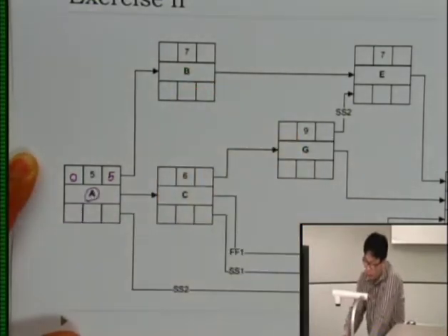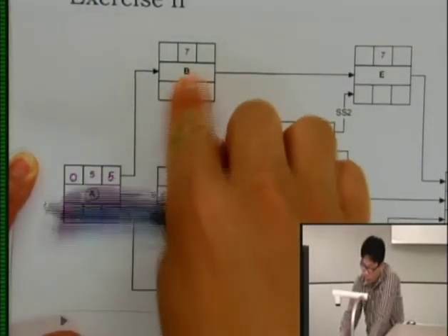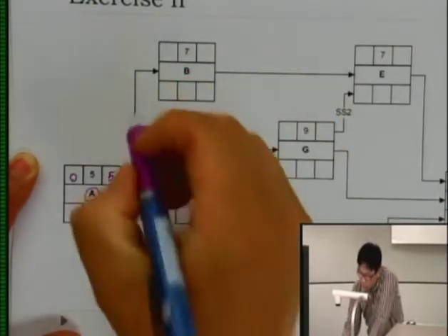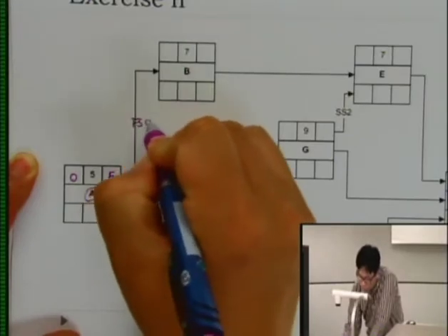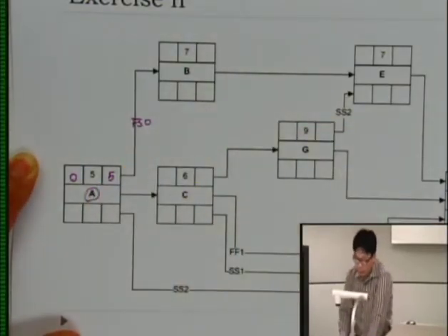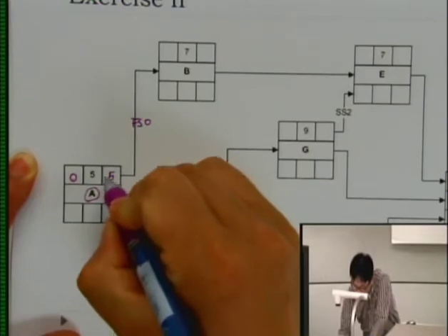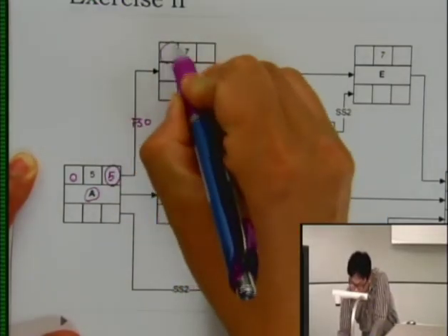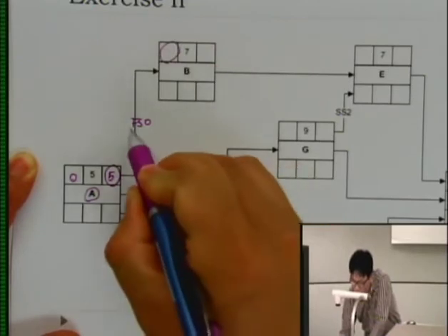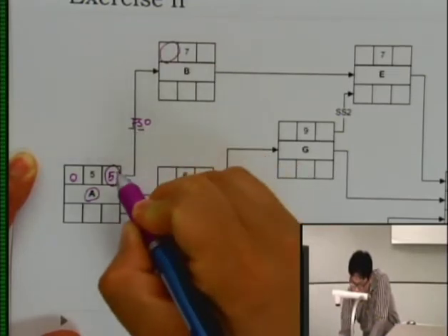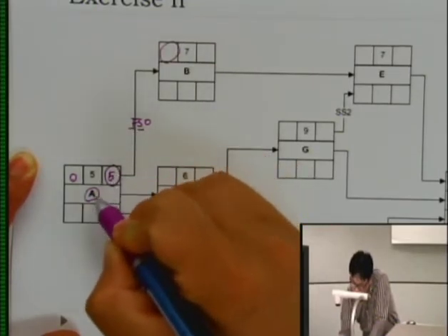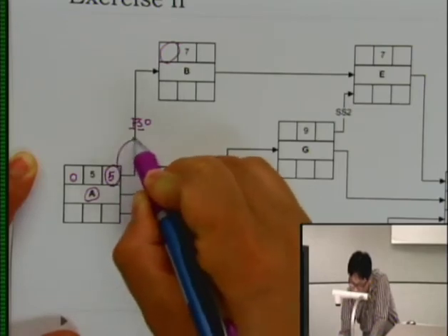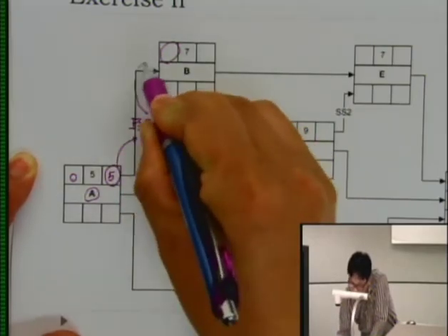The activity A and B, if you see, this is a finish to start relationship with 0 day lag. What that means, the finish of predecessor becomes your start. So how can you do that? This is a finish to start. So the early finish of activity A plus your lag becomes your start.